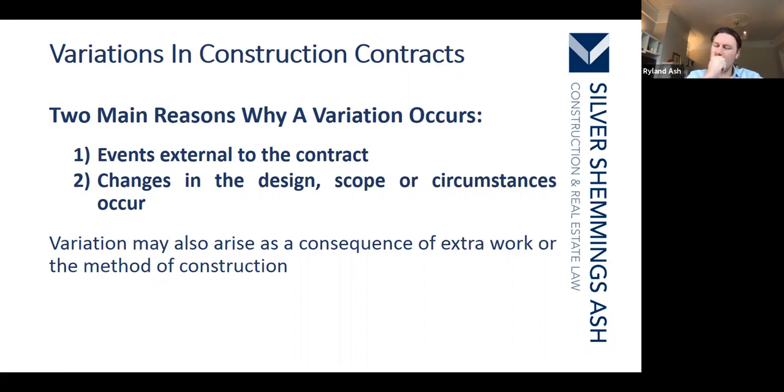However, it may be that the changing conditions on site are a variation nonetheless. And if they are, that would entitle a contractor under the JCT, at least, to seek to recover both an extension of time and loss and expense, because a variation is both a relevant event and a relevant matter.